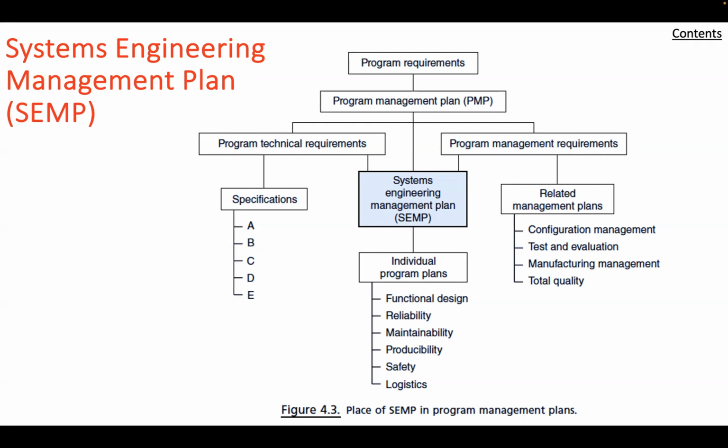First, development program planning and control, which describes the system engineering tasks that must be implemented in managing the development program, including statement of work, organization, schedule, program design and test readiness review, technical performance measures or TPM, and risk management. 2, system engineering processes.